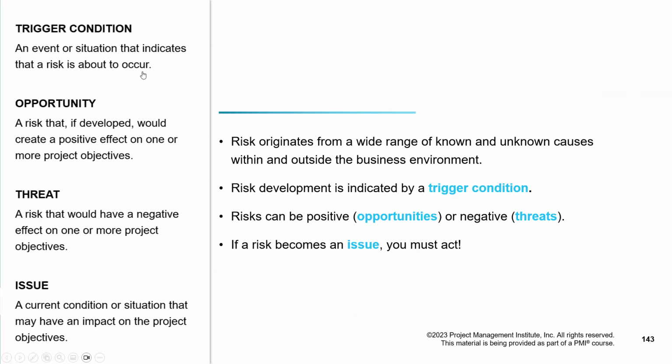Remember, all the actions against the risks must be taken in a timely manner, but it doesn't mean that they can be taken after a risk has occurred. The action on risk should occur before the risk has actually happened, so that we can somehow reduce the impact of the risk on the project. I hope you understand that point. So these trigger conditions will let us know that this risk is near.